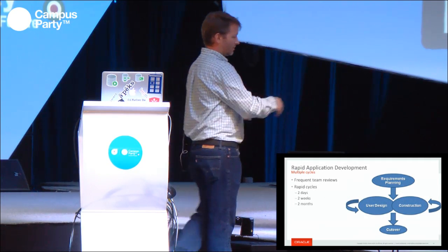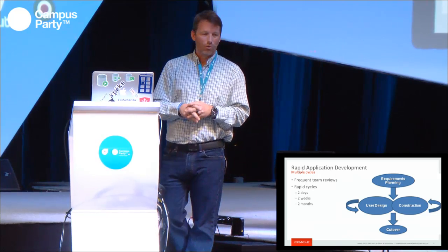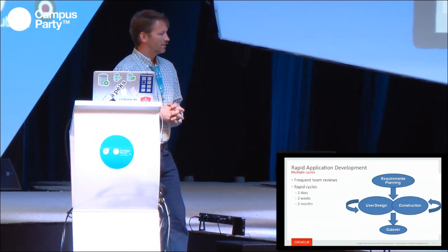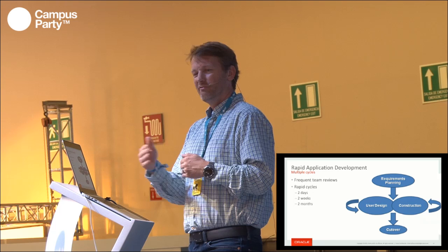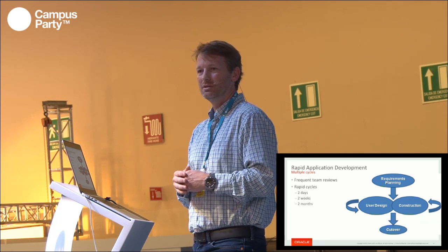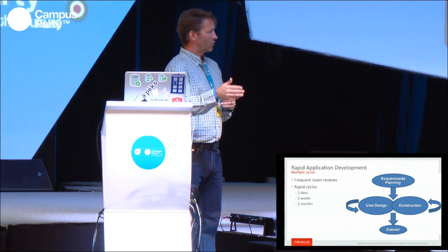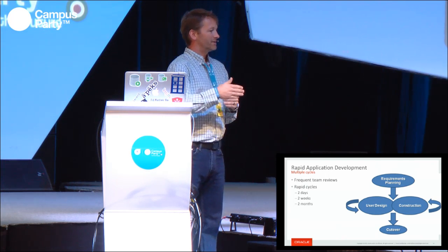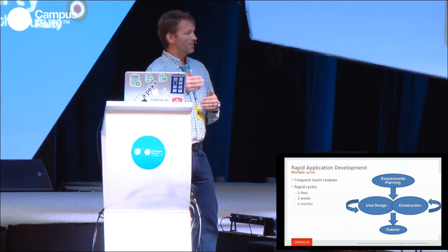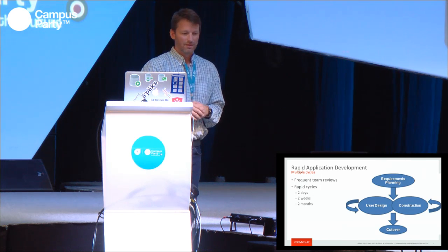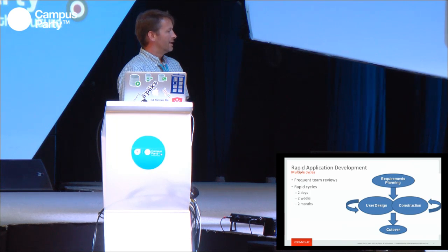So what that means is exactly what we were saying. The requirements are done. We have frequent team interactions. So Oracle, if anyone hasn't heard, we have our own cloud. So the way the Oracle cloud is built is very much like this. So every 4 weeks, basically, every team has an opportunity to deploy new things to the cloud. So what happens is we have to iterate what we're doing. If it's going to span more than those 4 weeks, we have to plan for that. So maybe if it spans two of those sessions, we would break it into modular pieces so that they can be built incrementally to be deployed in those cycles. So we build, we do these deliveries every 2 weeks, every 4 weeks, and we lay them out into the cloud.